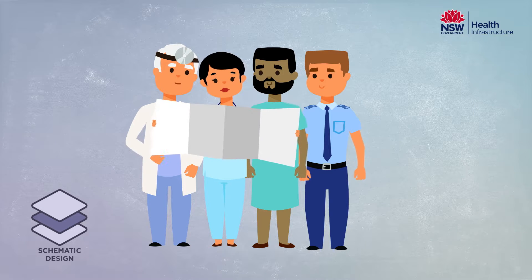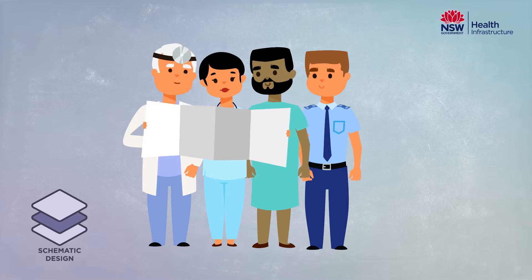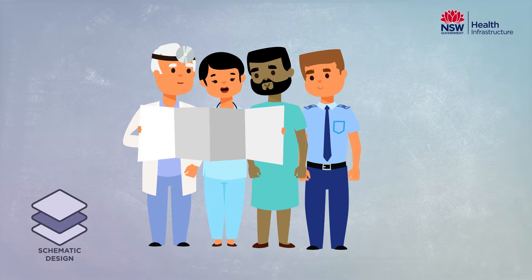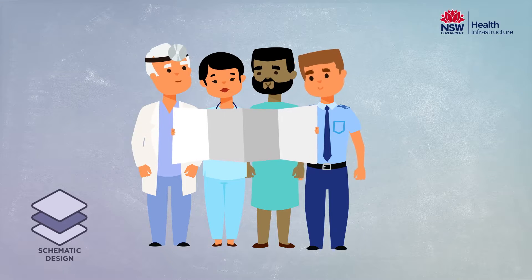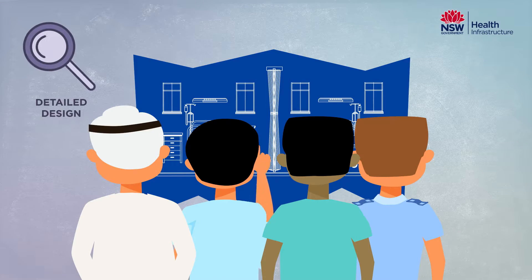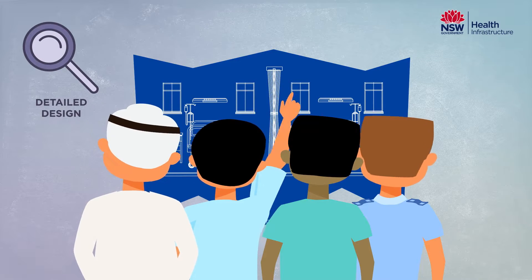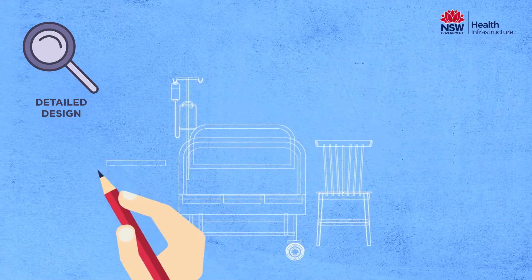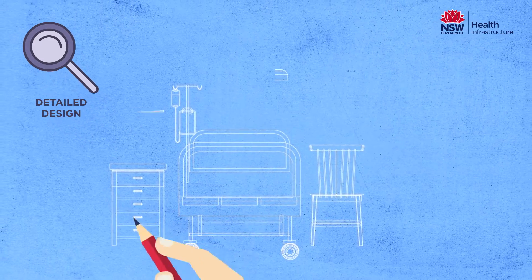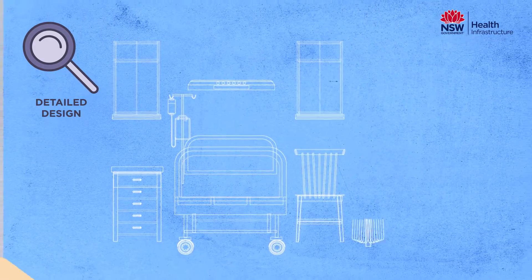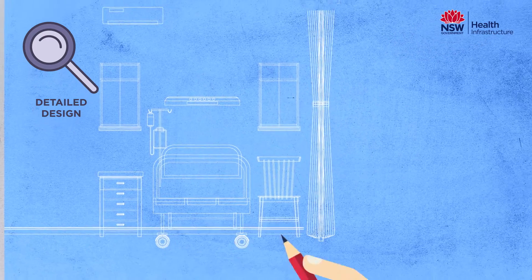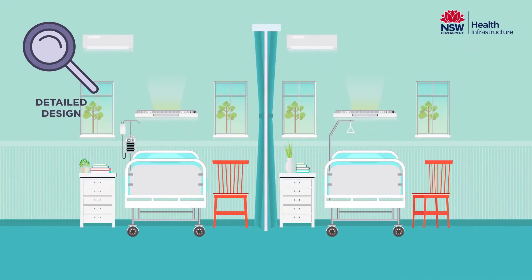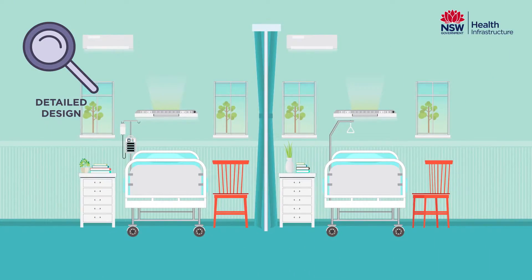Once schematic design is complete and reviewed by the project user groups, the redevelopment moves into the detailed design phase. During detailed design, the user groups look at the layout of every room and hospital space, such as the location of furniture, fittings and room colours, as well as the external facade and outside spaces.